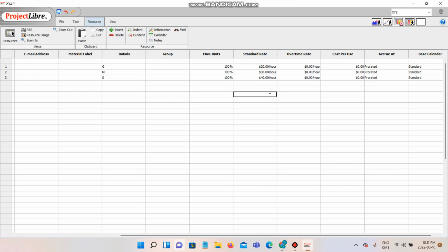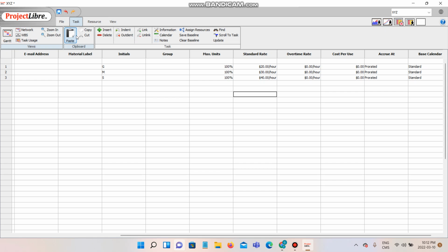So we can see that if we are working some overtime, more than 8 hours of work, then the overtime wage rate should be presented here. And if we are going with the 8 hour shift, then the normal standard rate should appear here. So now I am gonna assign these tasks to each resource. Let's see how our Gantt chart formation is gonna change. Let's move down to click on task and here Gantt chart.